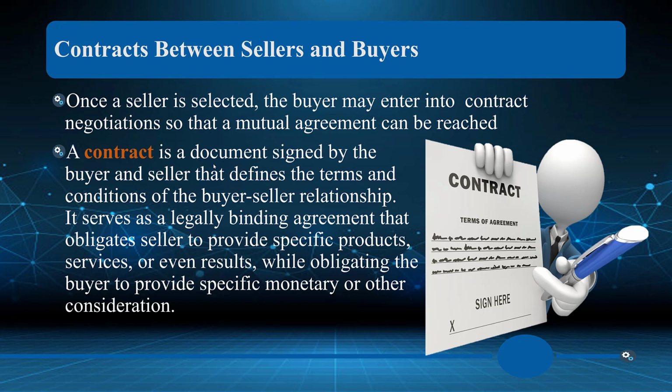I've done contracts as an IT consultant and a project manager where I felt comfortable. The project was small enough. It was a flat rate. We knew we could get it done. We've done it before. We knew we could commit to a certain number of hours and make that work, whereas sometimes time and materials projects work best, because if it's something that we haven't done or that's outside of our expertise, we don't want to bid 50 hours of contract labor to find out it took us 100 hours to do that.